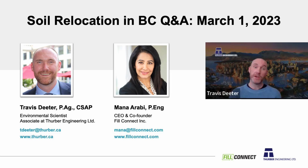Remaining soil. Yeah, and this is actually a great question because one thing you notice, these regulations are live. This is all in effect right now. So if you are in the middle of a dig, technically if you have not filed a notification, you should be stopping shipping your soil because you're not following the regulation as it is. There is no grandfathering period allowed by the ministry under this, unfortunately. So in this case, I would say, yes, you're assessing the 50% remaining. You'd only be responsible for looking at the soil that still has to be shipped. So that's the answer there.